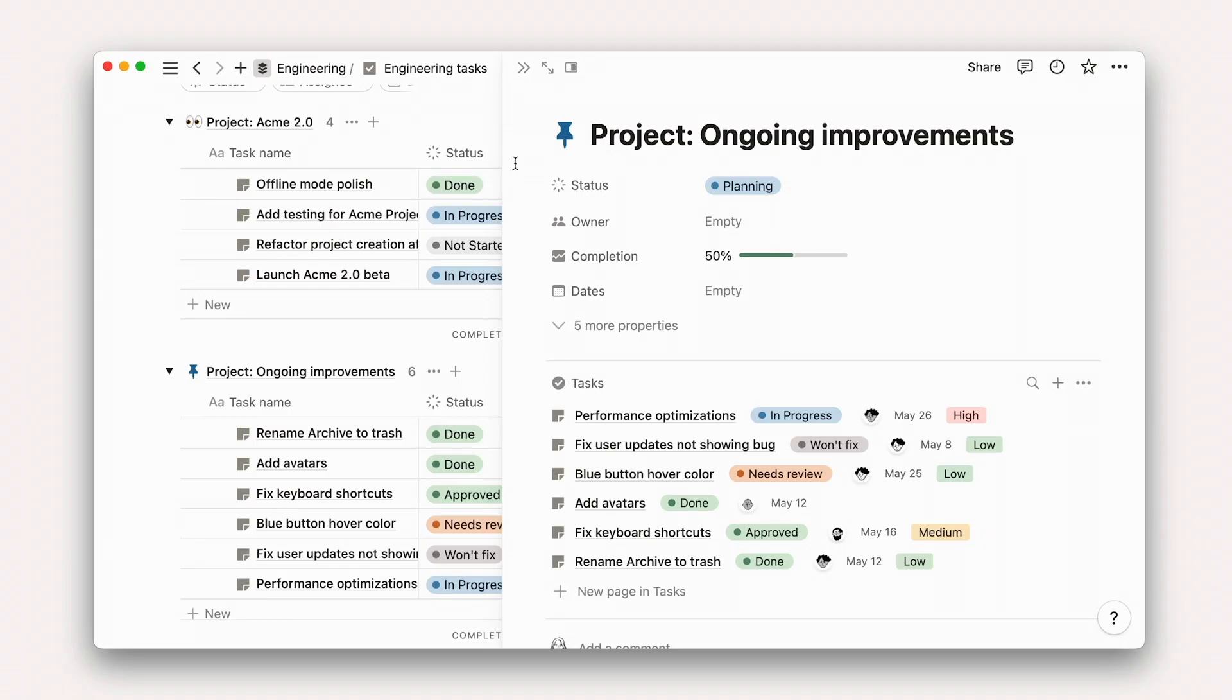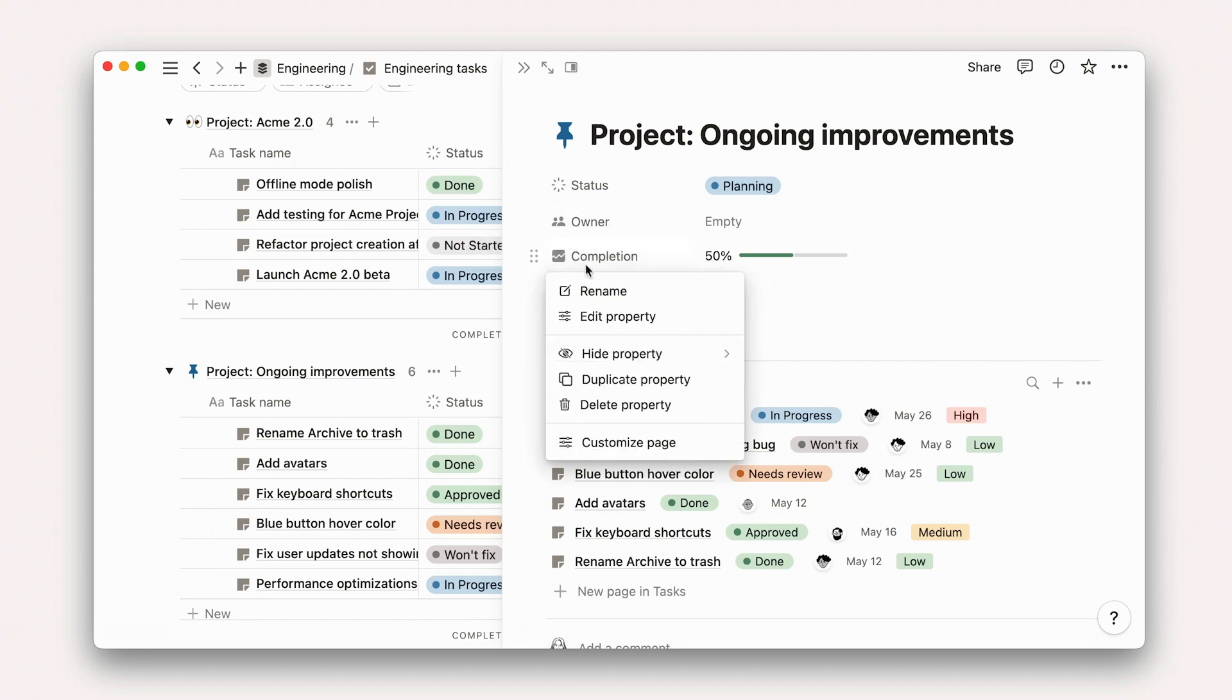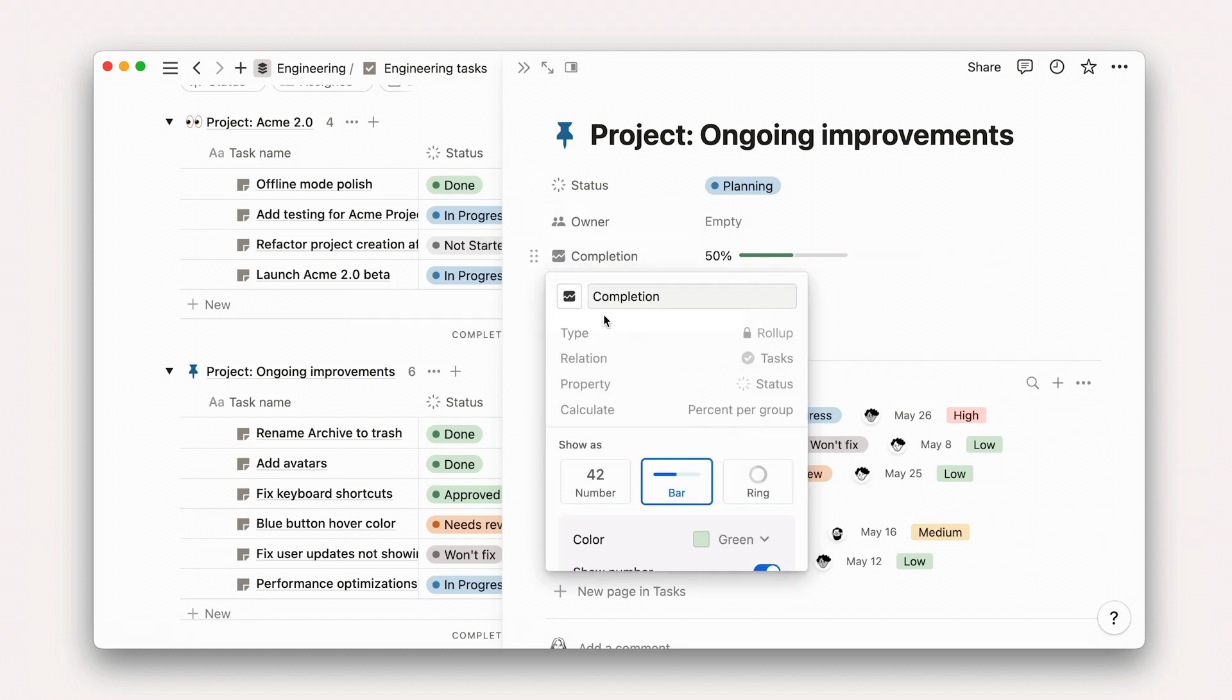We also have a concept of rollups in Notion which allow you to view data from a related database. That's how the task completion rate on your projects database works. It looks at all the tasks related to the projects, checks their status, and then rolls that data up into one nice number for ease of use.